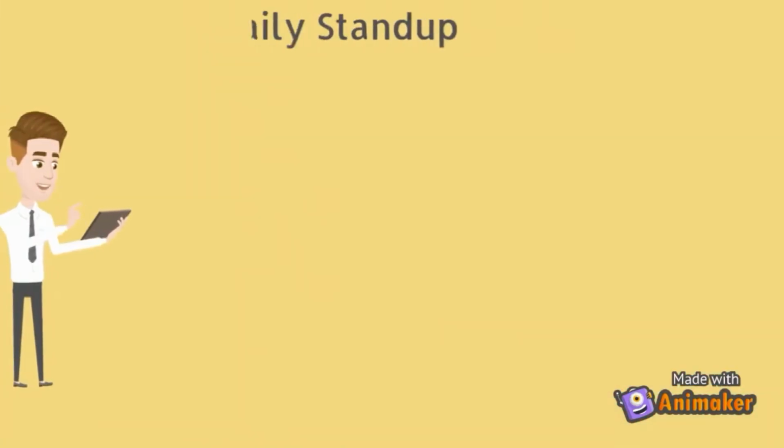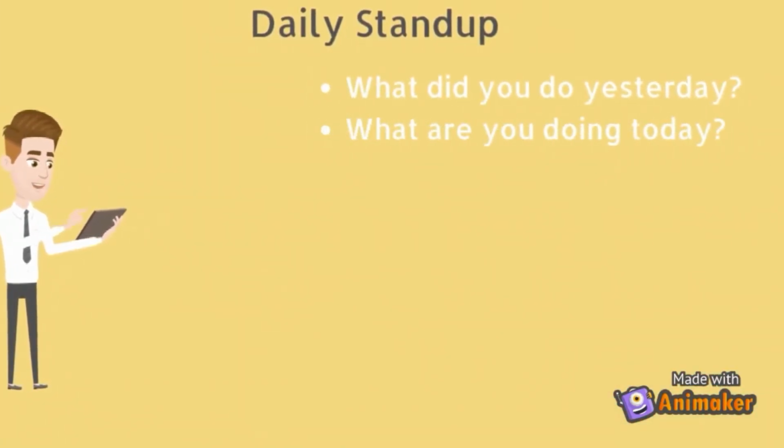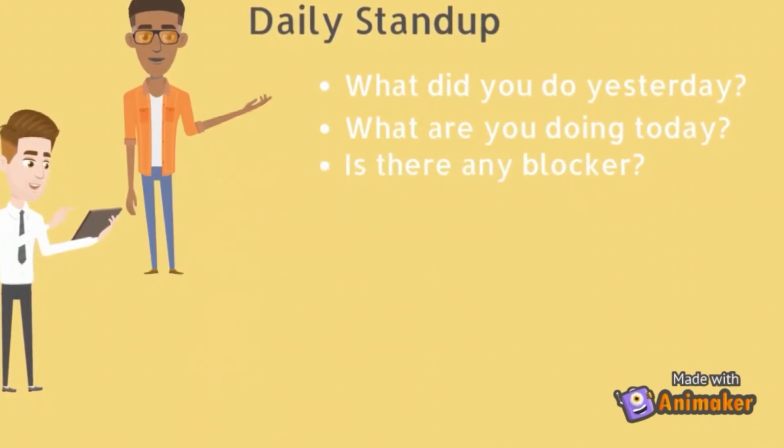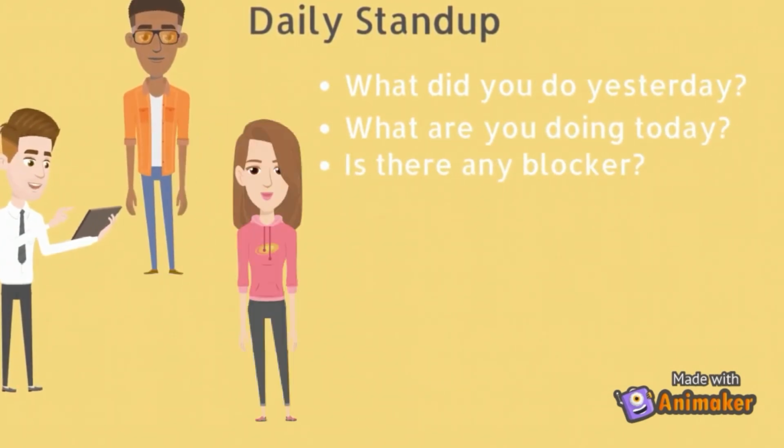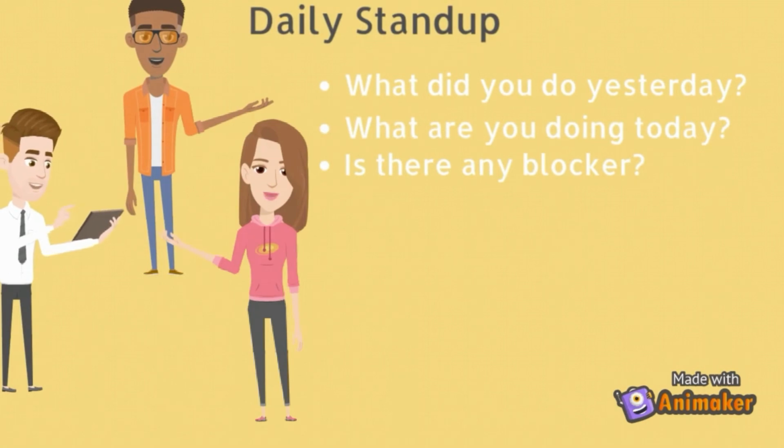Alright, let's start the daily stand-up. We will keep this short and each of us will only answer these 3 questions. What did you do yesterday? What are you going to do today? Are there any blockers? Alright.